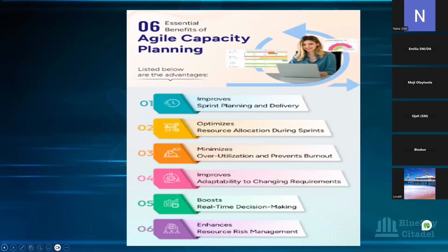The new person taking up that critical work is sizing it up. Okay, so this will take me this much effort to finish. And because I need to finish that, I might not have enough capacity left to do what I am doing. And then you're negotiating again with the product owner. Product owner, this has happened. This person is picking this priority work because the person working on it is not feeling well, is not coming in and everything.